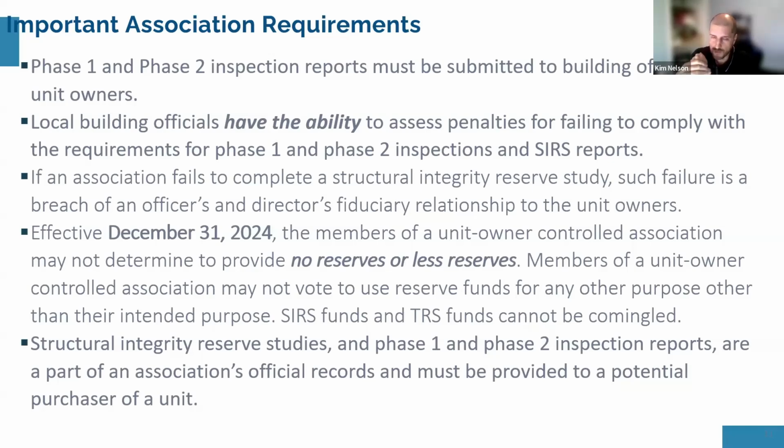I actually recommend that folks hire someone that's different than the engineer who did the phase 1 inspection, basically to avoid the possibility of people coming back and questioning whether the engineer who wrote the scope for the phase 2 inspection was mismotivated in their conducting the phase 1 by getting greedy and saying that there's damage to invite more scope of work to be created.